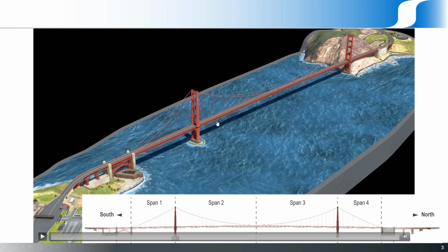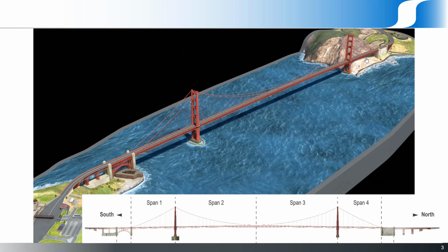The joint venture's plan was to put temporary work platforms called travelers that would move underneath the bridge to give them access to all the places they needed to work. And their initial plan even worked under here, but some of the changes that the district, the owner of the bridge, made that impossible and caused them to have to do some workarounds. There were a number of other things that caused workarounds as well. So anyway, just a broad view look at the bridge and how it's named.